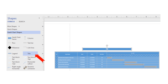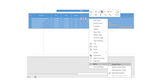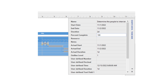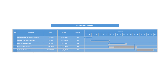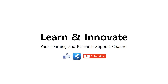You can add a title for the Gantt chart by dragging the shape title from the left pane. To include the percentage of work done for every task, right-click on the task bar to bring up the shape data. Then change the percent complete to whatever percentage reflects your work progress. As you can see, the progress has been indicated for each task. Thank you for watching, and watch out for our next research support videos. Please support this channel by hitting the like and subscribe buttons.